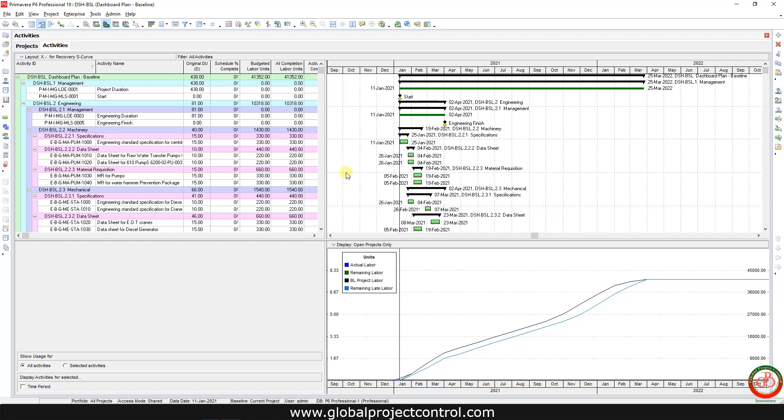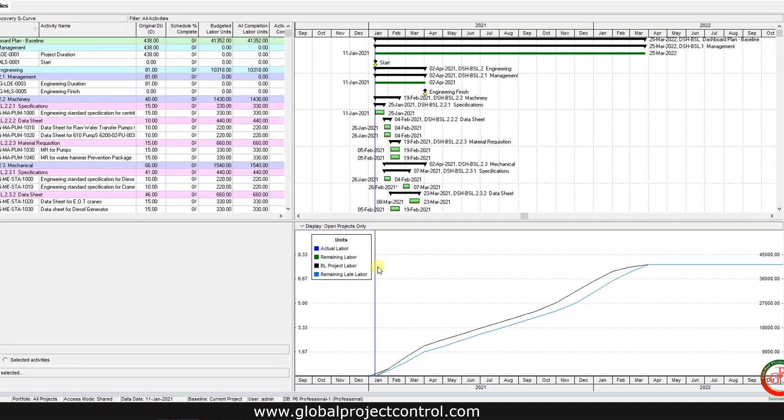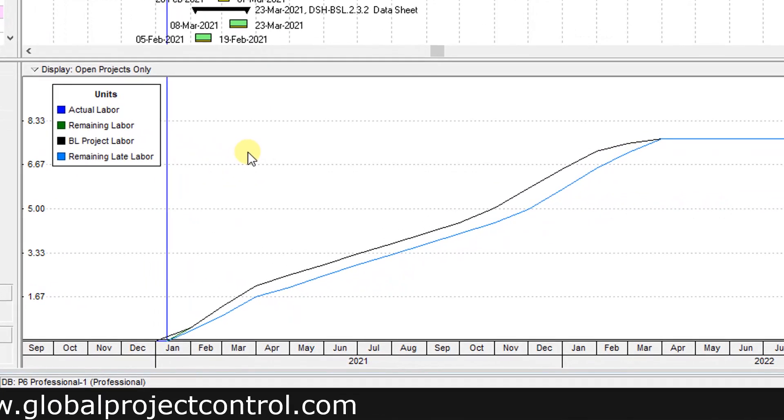First of all you need to go to the project and open activity usage profile. Then as you see over here we have the curve combination between baseline project labor unit, remaining labor unit, and remaining late labor unit.